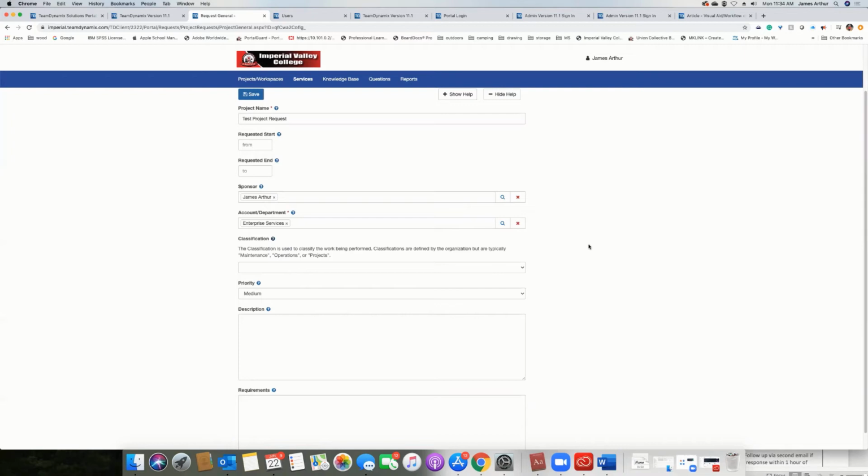And the reason that some people use that is to understand the project mix that they have in their portfolio, right? And again, if you go back to the Project Management Institute, they will say it is good to have a certain percentage of your active projects in all three areas. What that percentage is certainly is up to you. But roughly, and these are ballpark, the run starting out should be and probably is in the 50 to 60% range, right? The grow is in the 20 to 30% range, and the transform is in the 10, maybe 20% range, right?